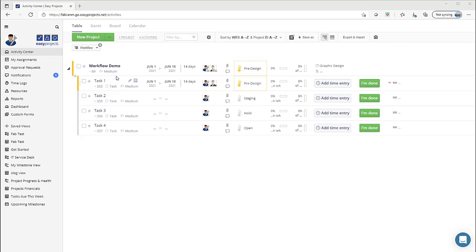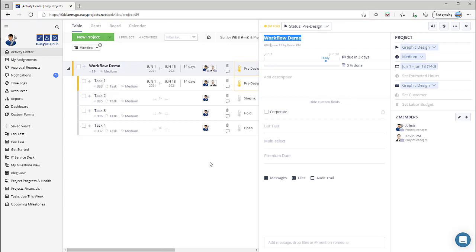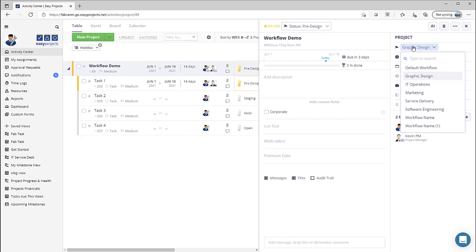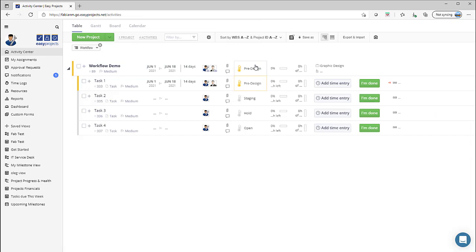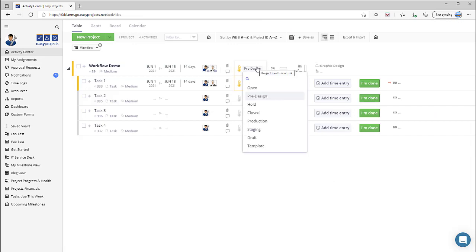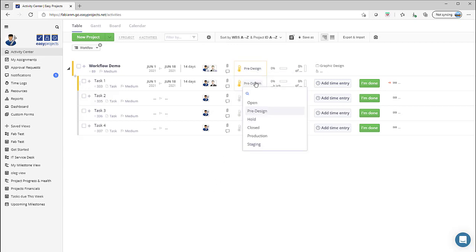So for this exercise we've got a project created called workflow demo. I'm going to select the details of this project and this is where we assign our workflow. In this particular instance I've assigned the graphic design workflow among the different selections of workflows that are available. Once that selection has been made, all of the statuses at the project level will follow through using that specific workflow, and the same would apply for any of the tasks or activities that are below it.